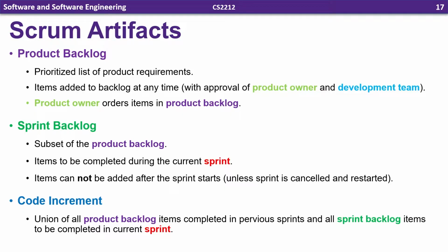Remember that we said agile methods want to deal with change incrementally. It can't be complete chaos where the product owner is just throwing new things in the backlog while you're actually working on it. That would make sense. So we have sort of a frozen backlog for the duration of the sprint. The product owner could still add things to the overall backlog, but at least what you're working on for that 2 week, 4 week block is going to be static and unchanging.